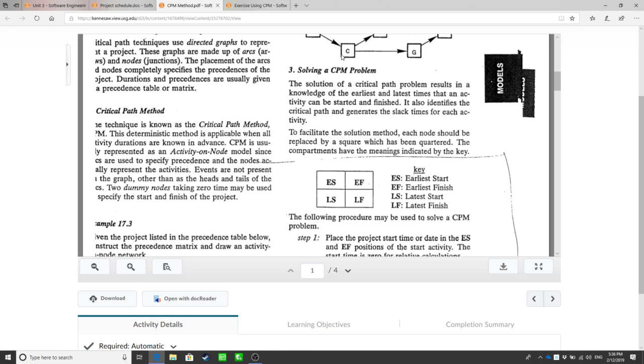That is the latest finish time. So what's the latest start time of this lecture? 5:15. Yes. So latest finish time minus the duration of this activity is the latest start time. And the other way, latest start time plus the duration is the latest finish time, right?